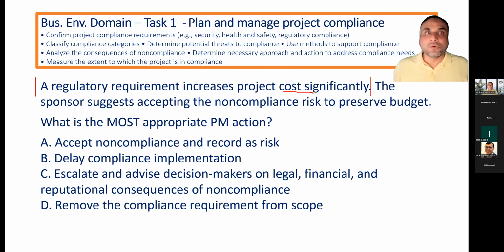So you will fix your risk management plan, right? Because in the risk management plan, you defined a stakeholder appetite and probability and impact, which means that the baseline didn't work. So you have to update this. Plus, you have to increase the contingency reserve and check your earned value analysis that you are on project schedule and budget. First thing, very good. If you are using a type of contract, which type of contract will work for this situation? Cost reimbursable, time and material, or fixed price contracts?